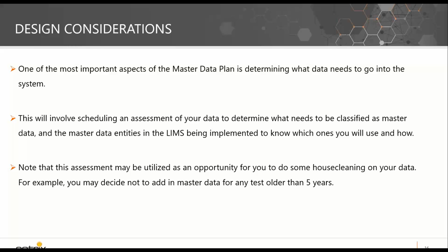Thanks, Kevin. So some design considerations as it relates to master data. One of the most important aspects is obviously understanding what data needs to go into the system. Very often this requires scheduling an assessment of the data to determine what needs to be classified as master data and the master data entities in the LIMS being implemented so that you can know which ones you're going to use and how. The assessment can be used as an opportunity for you to do some house cleaning on your data. So you might decide not to add master data for any test that's older than 5 years, say if you were migrating from a legacy system. Next slide, please.